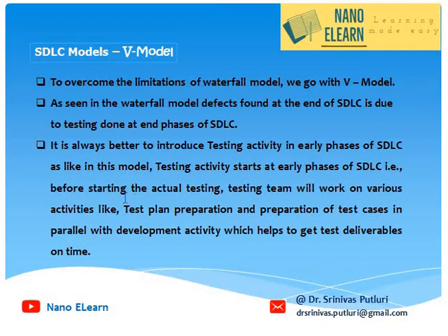As seen in the waterfall model, defects found at the end of SDLC is due to testing done at the end phase of SDLC. That is, only during the testing phase, the actual testing will be done in the waterfall model, and the testers used to find the defects only at the end phase of SDLC, that is during testing phase. But it is always better to introduce testing activity in the early phase of SDLC, as like in this model, testing activity starts at early phase of SDLC.